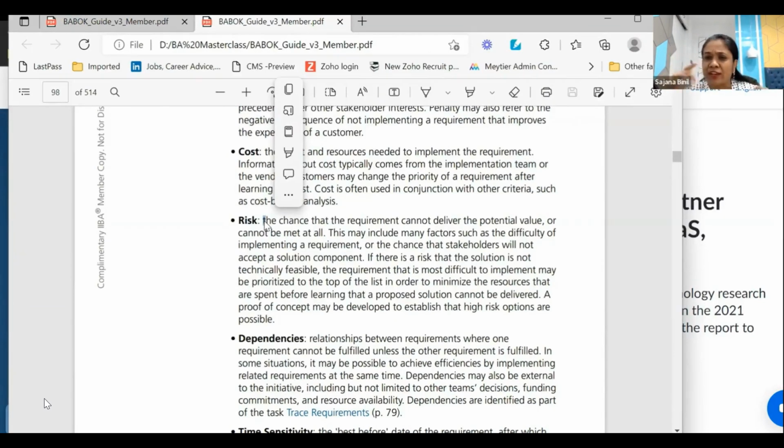So all this you will gauge, guys, when you discuss with the customer. You'll figure out that this is not an urgent change for him. This is something that he would like to do, but he has time to roll it out. So if in a particular release I have enough items loaded in the bucket, then I would tell the customer that it's better that we don't take a risk with this item, because this item can break 10 other items. So let's look at this item in the next release. So that's the risk parameter.